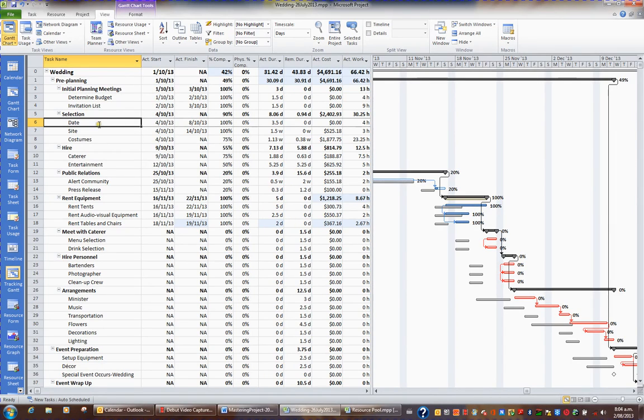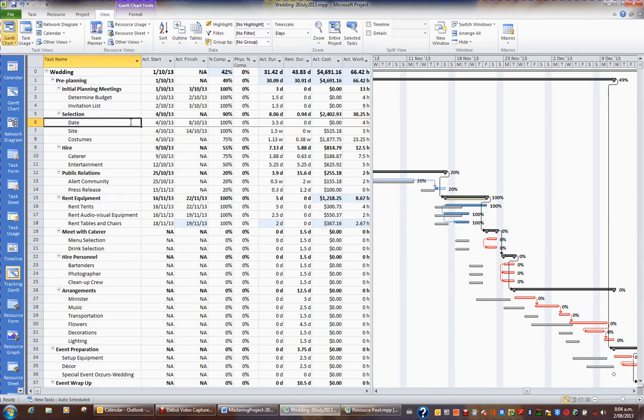When we were doing data entry to plan our project, we used the table called Entry. When we started tracking the progress of our project, we used the table Tracking.